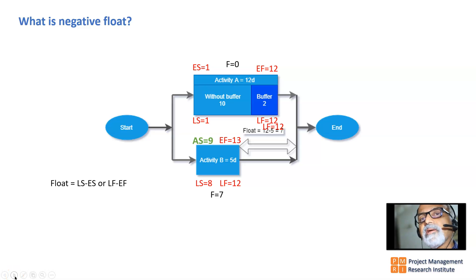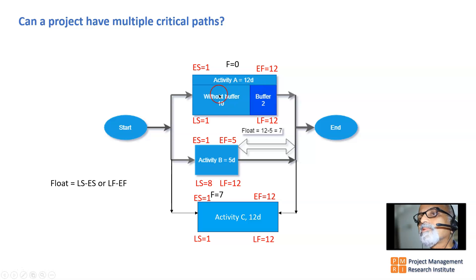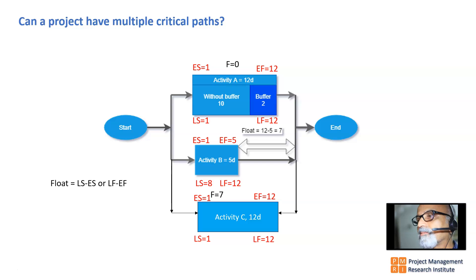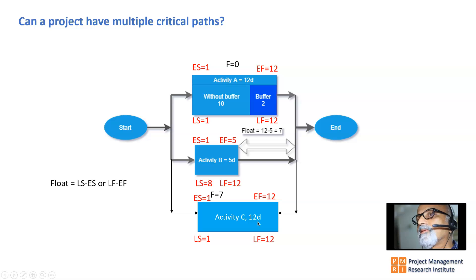Can a project have multiple critical paths? If I add Activity C with a 12-day duration alongside Activity A (12 days) and Activity B (5 days), working out the float shows Activity A and Activity C both have zero float. So Start→A→End is a critical path and Start→C→End is also a critical path — both have zero float, meaning a project can have multiple critical paths.